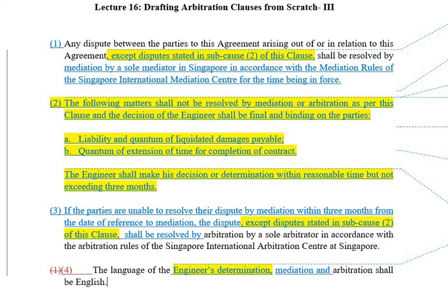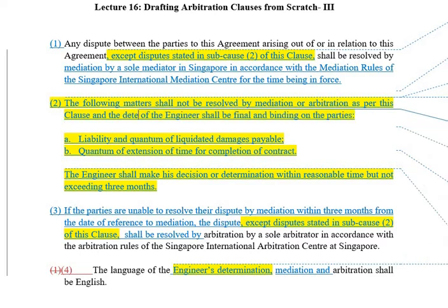To make this clause more certain, rather than decision, we can call it determination. Okay. Whether parties wish to provide for arbitration in case parties or any of them are not satisfied with the decision? No. Expert determination, once done, is final and binding on the parties, and there is no arbitration provided for.